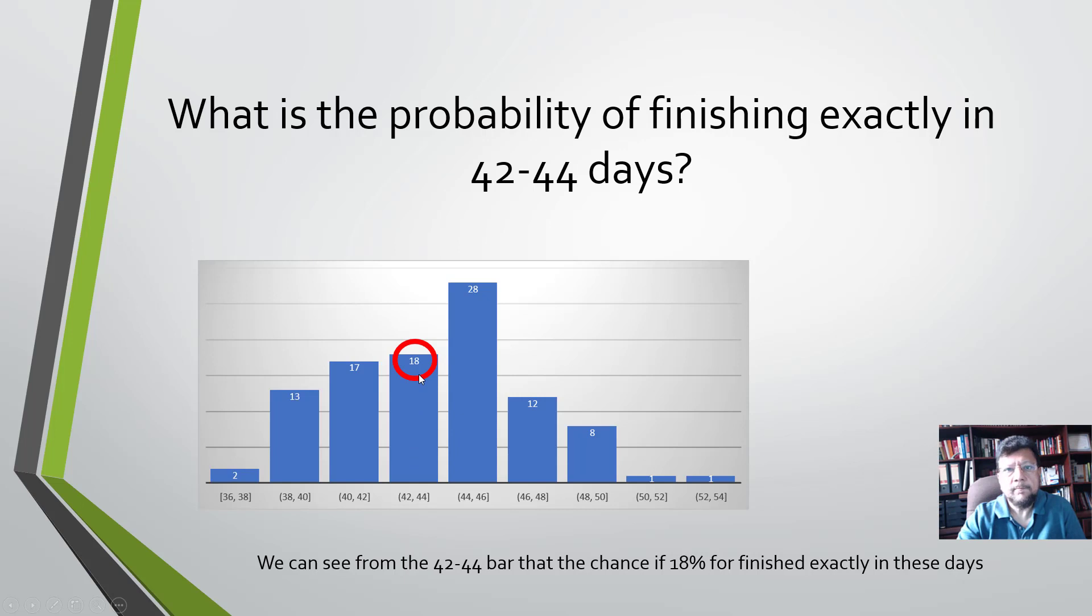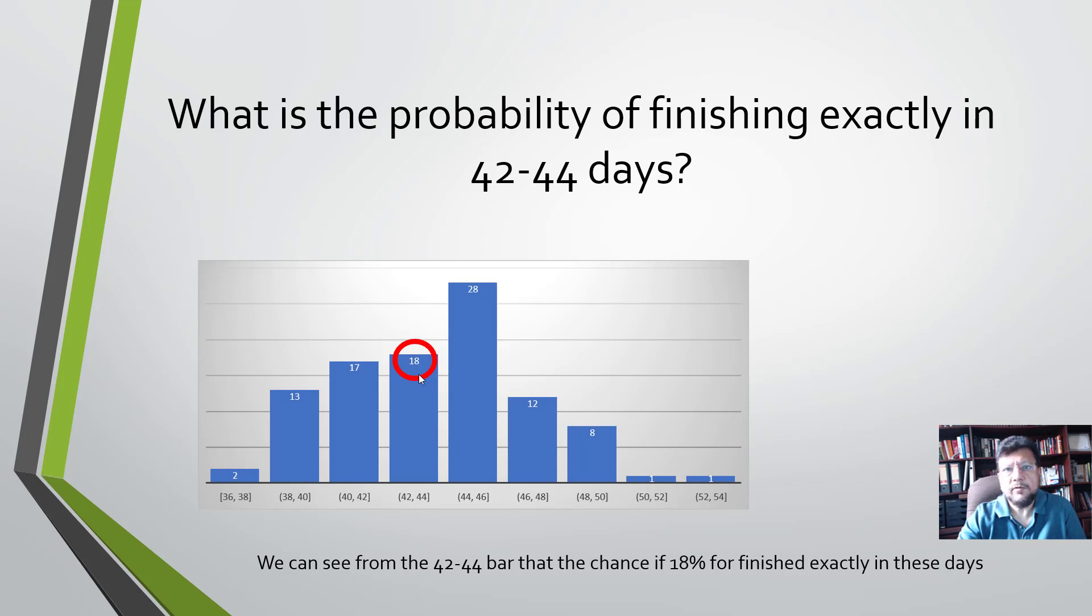So the bar for 42 to 44 days shows that it has a likelihood of 18 percent. So we can say that there's an 18 percent chance that the project will finish between 42 and 44 days.